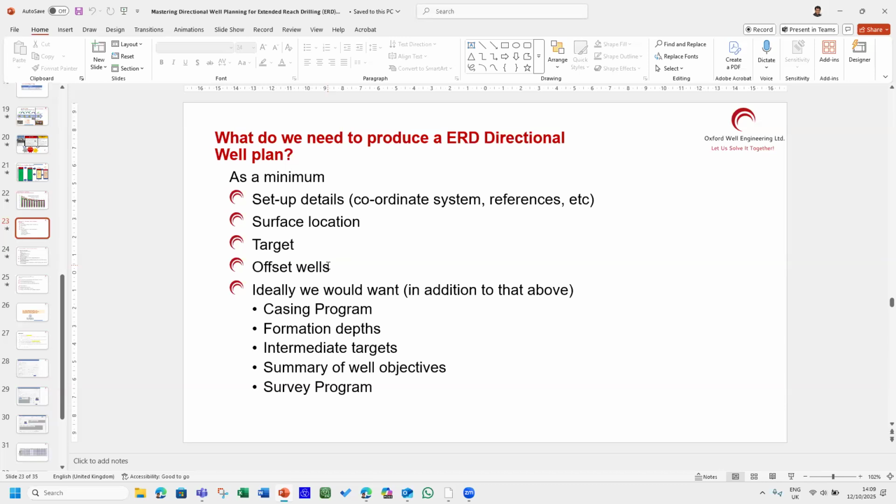One is, let's say, pre-planning phase or early planning phase. You have look-see directional well plans. Second one is the kind of selection phase, or you are going through iterations. Then Rev A, B, C, D's will come into the picture.